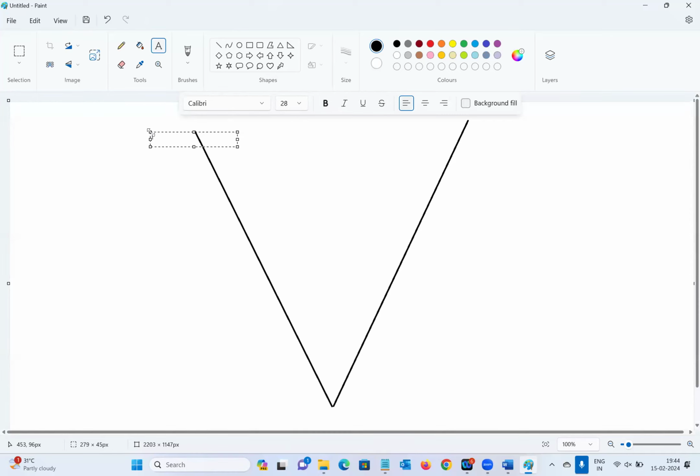I'll take the building plan from the builder. Based on the plan, I'll estimate how much wood is required, how many doors, shelves, windows, and how many designs. I'll purchase the wood and in those 6 months prepare all those designs. Once 80% of construction is completed, I'll go there directly and fix them. So here I can save time, right?